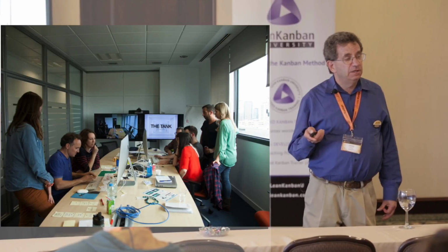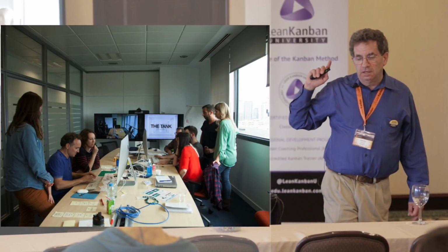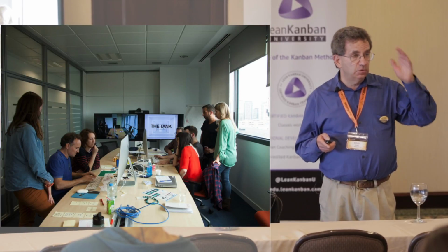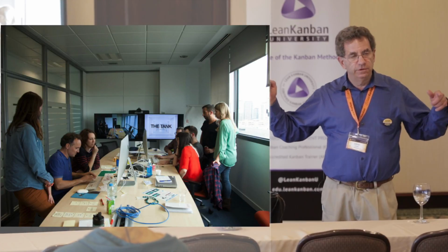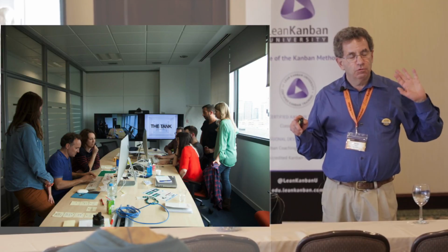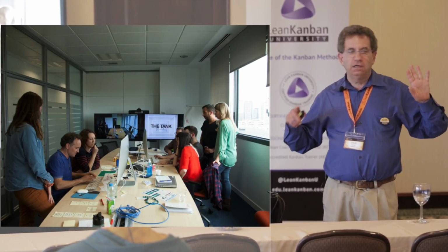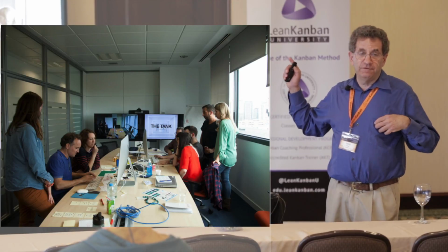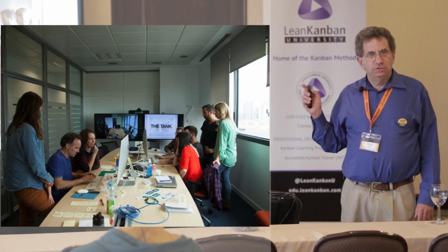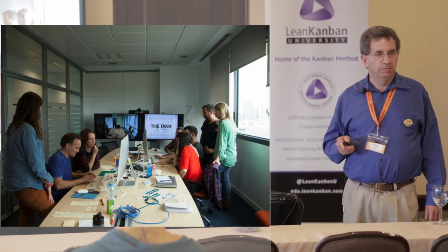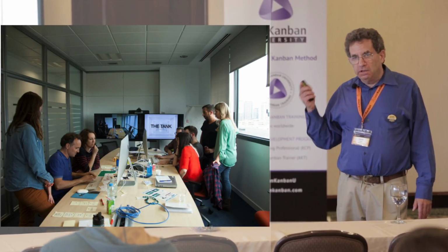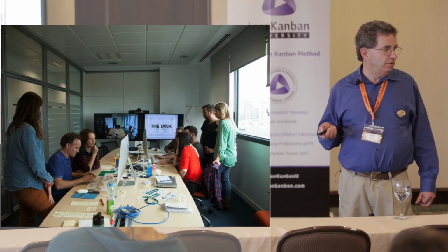We had so much collaboration that one of our other teams was able to reduce a process that creates the storyboards for some online banner animation. The creation work would take 20 minutes, and the end-to-end approval process would take 2 weeks. We got from beginning creation of the storyboard to approval in 2 hours for 4 storyboards. That's the kind of improvement you can get by applying all aspects of the Kanban method, in particular collaboration and experimentation.